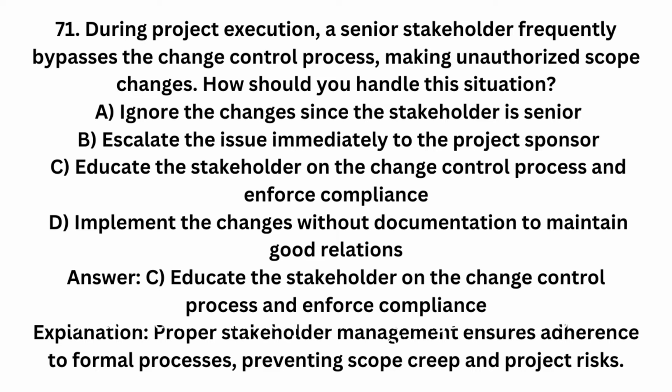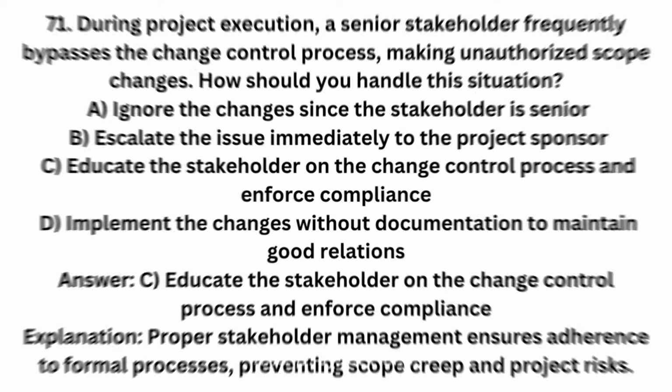C. Educate the stakeholder on the change control process and enforce compliance. D. Implement the changes without documentation to maintain good relations. Answer. C. Educate the stakeholder on the change control process and enforce compliance. Explanation. Proper stakeholder management ensures adherence to formal processes, preventing scope creep and project risks.